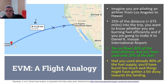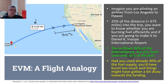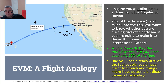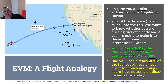Now suppose you are the pilot and you've flown 30 percent of the distance. You check your fuel consumption and you've used only 25 percent of your fuel. Do you feel comfortable? Yes — because you used 25 percent of fuel for 30 percent of the distance, meaning you have enough fuel to complete the flight. But suppose instead you've covered 30 percent of the distance and burned 40 percent of the fuel — that means you might run out of fuel in the middle of the ocean, so you have to do something.